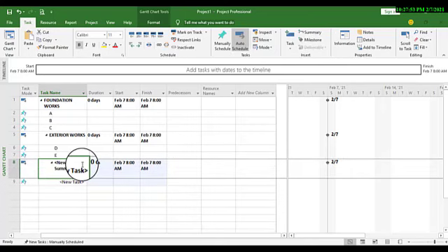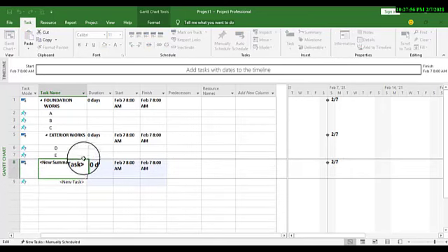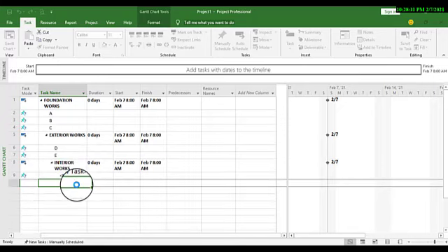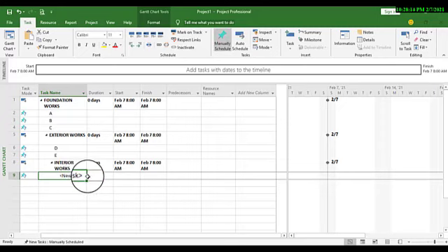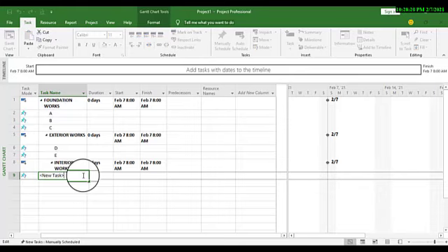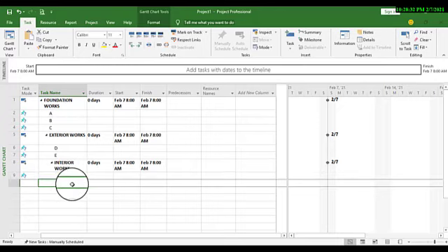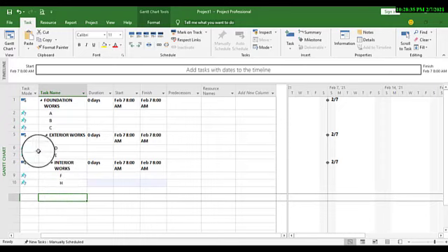Okay. Now, the last WBS that we are going to create is our interior works. So click on the summary task, and then you type in our WBS, which is the interior works. Under the interior works too, there will be various activities that we will perform. So let's say we have activity F and then activity H. Very good.